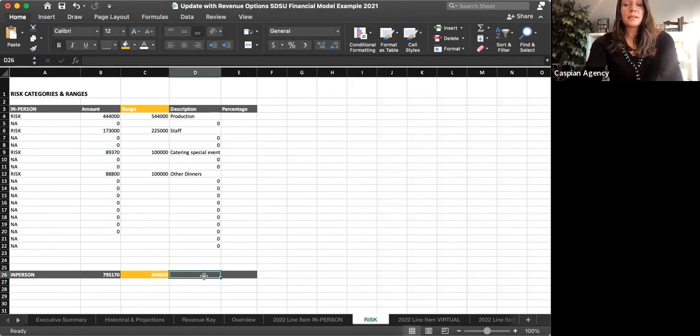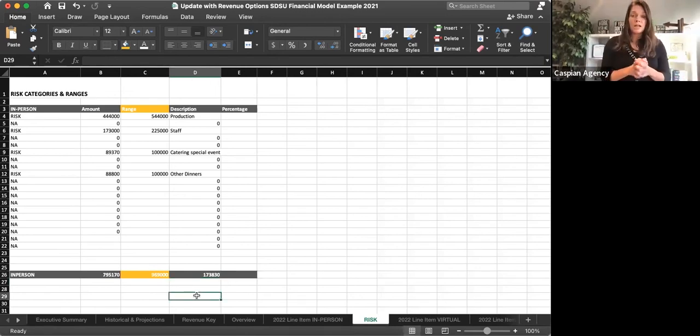So in a sense, equals minus, I could say, hey, if you want to be real cautious, I'm going to recommend, and right now I'm in D26, I've been seeing our risk categories are starting to climb, and based on my reading of all this evidence and things coming in, I think you might want to put aside 175,000 of extra contingency for these particular risk categories. That is a really nice way for me that I do my categories of risk.